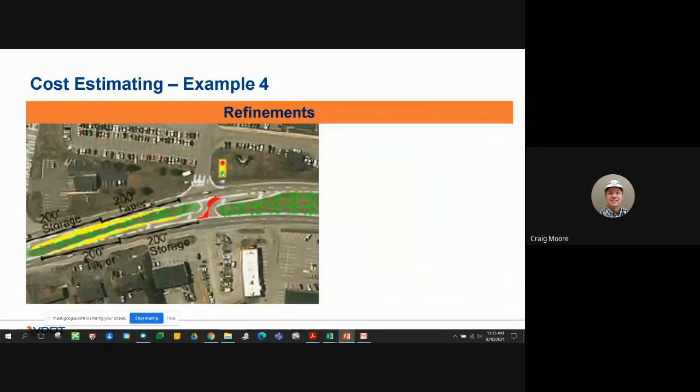Continuing on north, looking to put a signal head in there. So again, fairly straightforward, doing a little bit of work here with our movements into the high school. Most likely you would anticipate school buses going in there. But also another consideration is how do they get their supplies for their meal preps and things of that sort? Is that by tractor trailer as well? What other considerations? And those are things that can all of a sudden cause your estimate to explode.